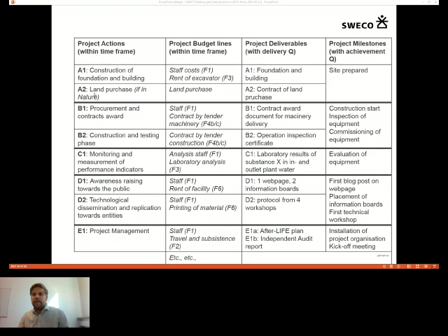Okay, here we go. Should we have deliverables per each action? Yes, at least one deliverable per each action. I would advise that it's one deliverable per each action. There is no added value for anyone to include millions of deliverables per each action because every deliverable you also have to deliver if your case officer, or project officer, decides to put it into the grant agreement. And it's kind of a pain to report a LIFE project and therefore, well, keep it to a minimum, and otherwise they will bring this up in the revision phase that you might need to deliver a bit more.